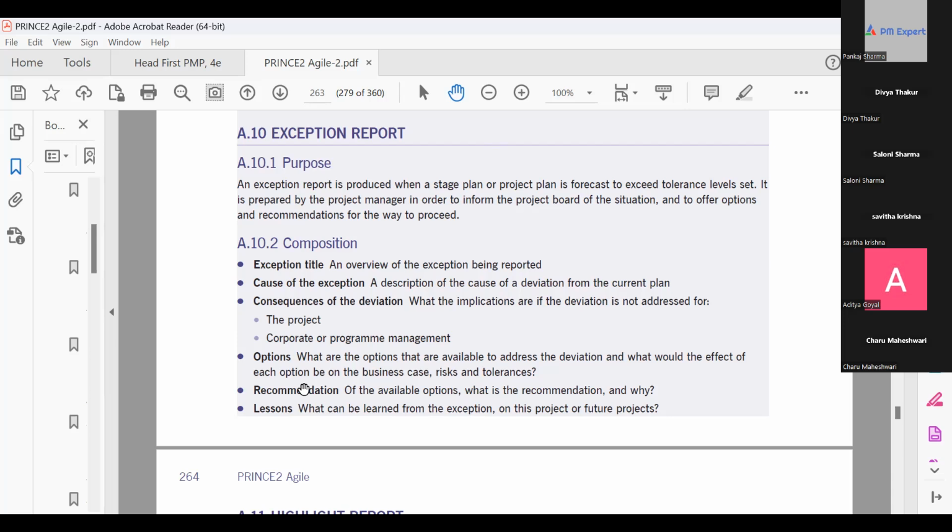But if instead he would have written a mail like this: based on yesterday's meeting, we know it's a big risk to have the team on board by the time we start the project. And then he would have shared some options with me. Option 1, we can prioritize the scope and focus on high priority items so that in parallel, we can ramp up the team, and recruit people with critical skills first. Option 2, we have some internal resources available with the skills in some other teams. Third option, we can have a mix of internal resources and some external suppliers in place.